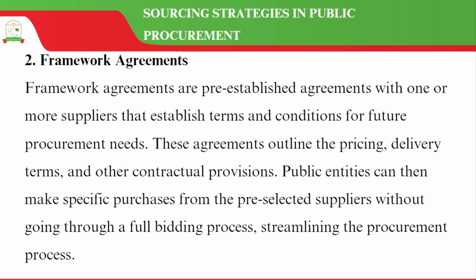These agreements are going to outline the pricing, the delivery terms, and other contractual provisions. So public entities need to make specific purchases from pre-selected suppliers, and they need to do this without going through the bidding process. This is sometimes done by public institutions. One of the benefits of this kind of method is that it simplifies the procurement process.